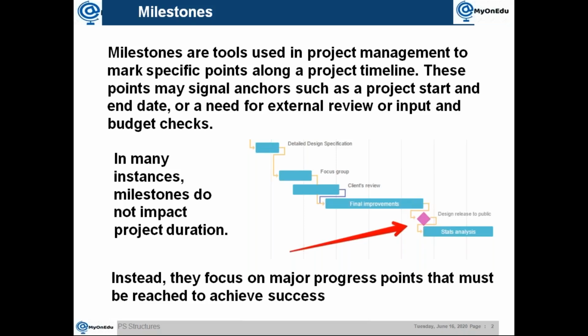That is one thing. Second thing, the same activity or same task is used there in MS Project. If you make it 0 duration, then that will turn it into a milestone. Okay. But in SAP, it's not like that. You have to create it as a separate object. You need to create it.